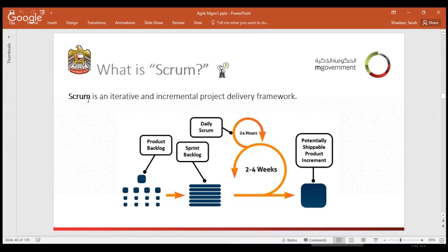Scrum is an agile way of doing project management to deliver the project in an iterative approach. All the product requirements are listed in the product backlog. For each sprint, which means the iteration, we deliver the software in a series of iterations. The sprint backlog is the selected customer requirements for this sprint. For this sprint, we are going to implement those specific functionalities that have been selected from the backlog. And this is where we're going to have a workable solution of the software fulfilling those few requirements that have been selected into this sprint backlog. Okay.